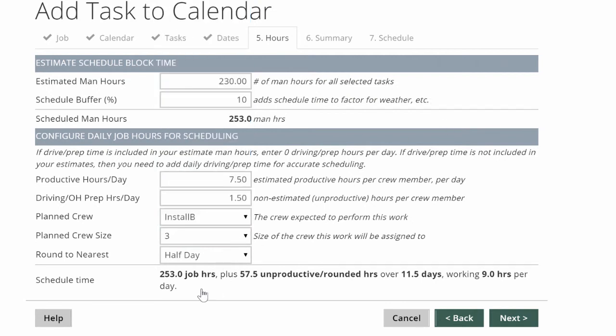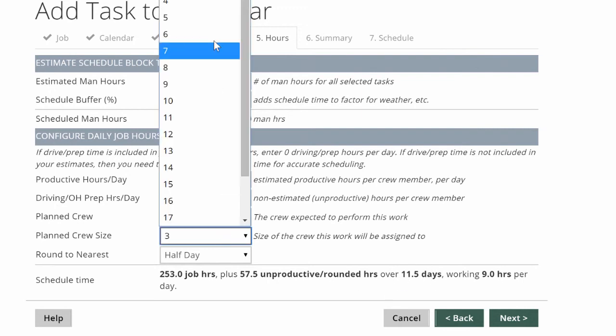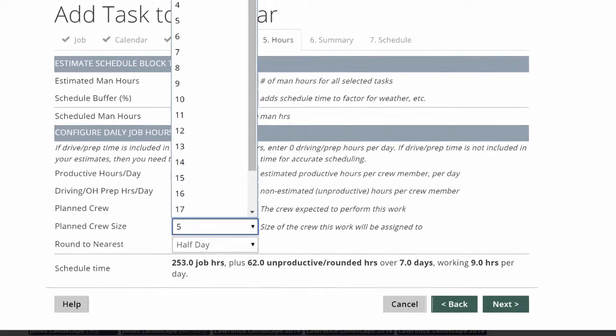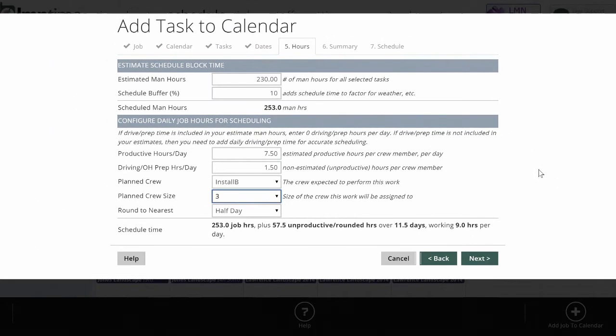At the bottom here, I can get a calculation of exactly how long this is going to take. With a three-man crew, it's going to take me about 11 and a half days. If I used a five-man crew, I could finish this job in seven days, so I can do some planning or thought here in terms of how long it might take to get the job done.